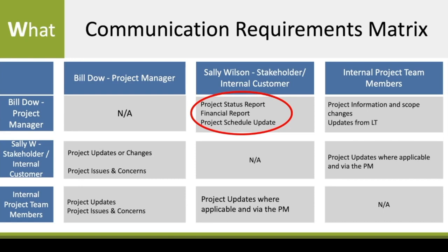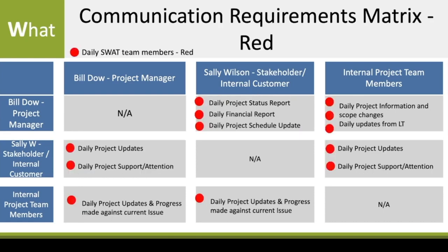But again, what happens when a project goes to red? Okay, so now who wants to see what in a red situation? Well, Sally wants to see a daily staff report, a daily financial report, a daily schedule update, right? So the team member, Sally wants to send that information, right? So again, we're starting to apply the color conditions to our communication requirements matrix.